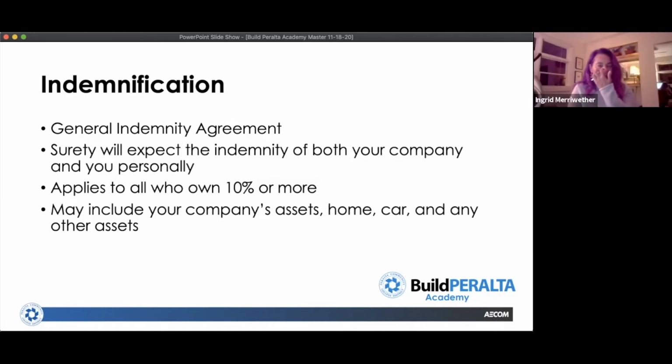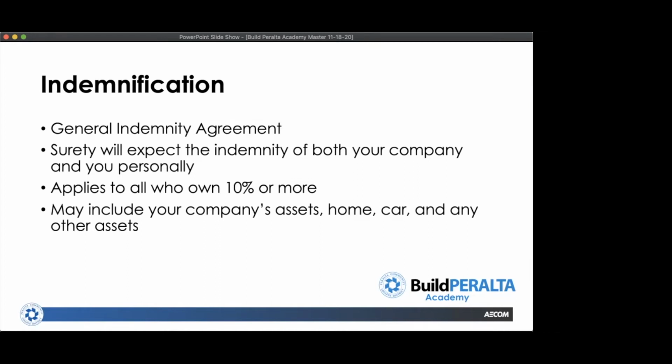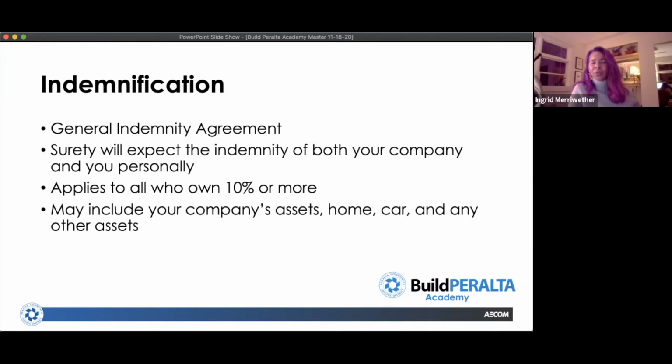Not necessarily. That isn't always passed through to a subcontractor. A lot of times it depends on the work. So, for example, I'll use a painter as an example. You generally don't need a warranty period for painting work that's done. You might have touch-up paint that has to be done after you complete the work, but generally a warranty period isn't required. So it varies, but that's generally built into the payment and performance bond. It's not a separate bond that has to be secured. And as I said, it's usually only 90 to 120 days.